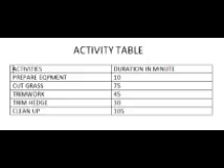So we make a table, a simple table that tells us the activity and the duration of that activity. So preparation, to prepare equipment, takes 10 minutes, like I said earlier on. Then what activity comes after preparing the equipment? Cutting the grass. So you cut the grass, that takes 75 minutes.